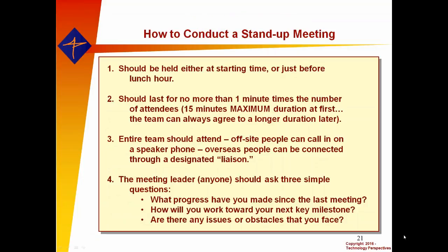So what goes on? First of all, the frequency of the stand-up meeting is a feedback process. So to some degree, it should be determined by the speed at which work is progressing. But what I found from a lot of experience in this is 2 to 3 times a week seems to be ideal. A daily meeting is something I used to teach, daily stand-up meetings. But what I found is that there just isn't enough changing between meetings to justify those extra everyday type activities. So 2 to 3 times a week breaks that time batch of a week or two into shorter increments with better feedback. Even 2 times a week will give you a tremendous benefit over just having a weekly meeting. So a Monday, Wednesday, or Thursday, or a Monday, Wednesday, Friday, roughly equally beneficial.